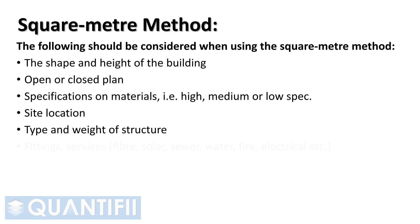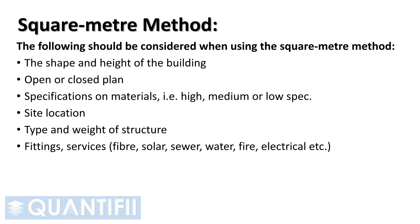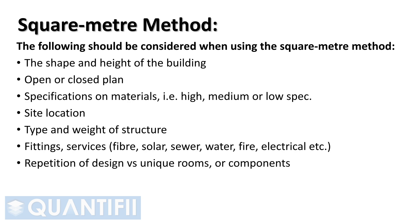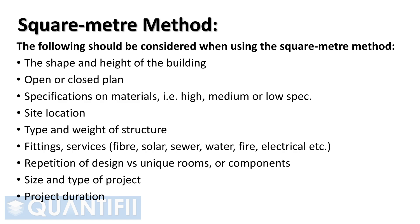Fittings and services — for example, fiber, solar, sewer, water, fire, electrical requirements, etc. Repetition of design versus unique rooms or components: in the instance of a hotel, if rooms are copied, this will be easier to estimate than a building design with varying rooms. Size and type of project. Resource costs increase over time, therefore longer projects need to take into account inflation of costs. When work is scarce, resources generally cost less, so local and market conditions should be considered.